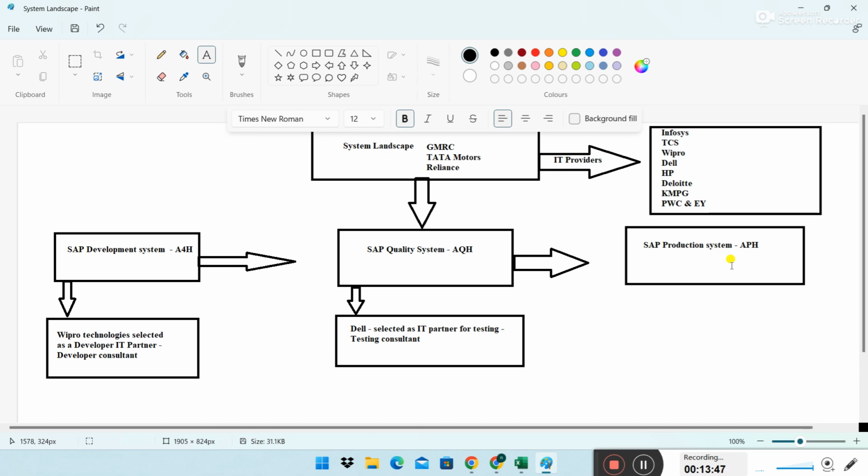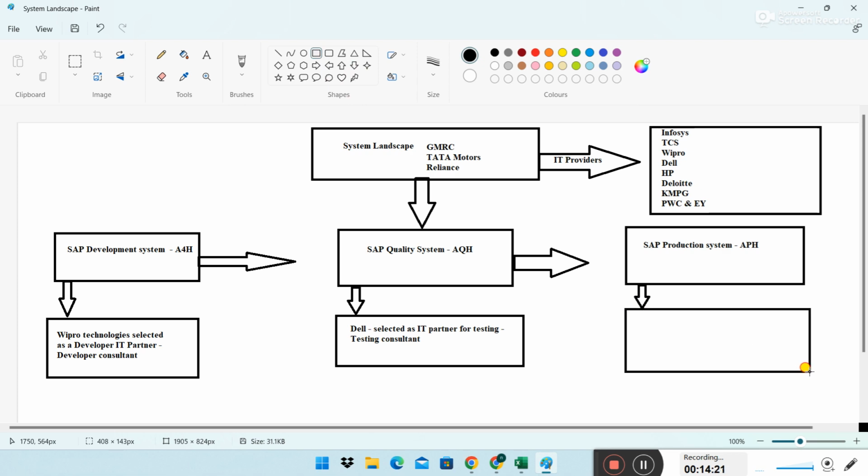What if there is an issue and you are not able to fix it? If my system is down for 4 hours, maybe 1 hour, and you are not able to restore, how much penalty do you pay, right? That needs to be written. If there is no penalty, nobody takes it seriously, right? That is the reason every contract will have penalties written clearly. So for this, maybe which company is selected? Maybe Infosys is selected. Okay, to support Reliance, you finalize the Infosys agreement and Infosys and Reliance signed it.